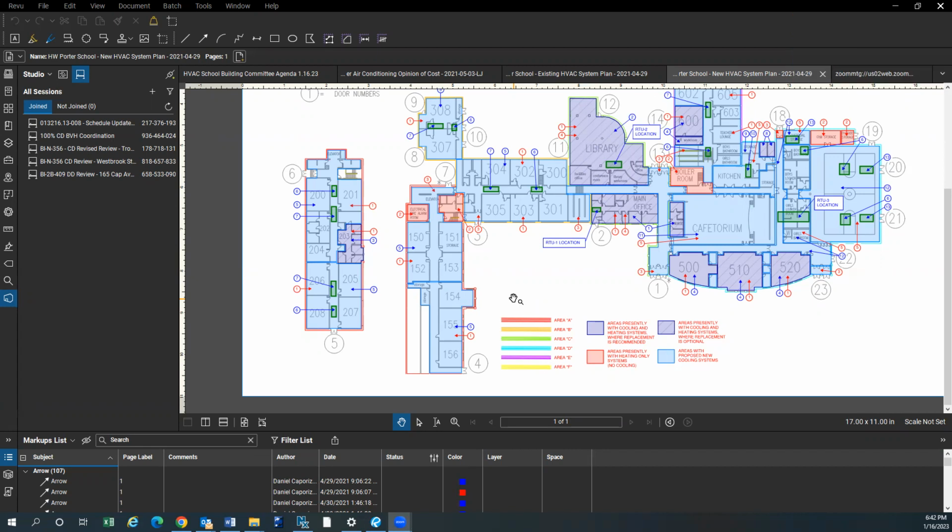So my recommendation would be you get your design team in place, you bid it out, and then you're ready to go, meaning that you've got everything probably bid and done by, let's call it, midsummer this year. You bid it out, you get done what you need to get done electrically between now and the spring of 24.